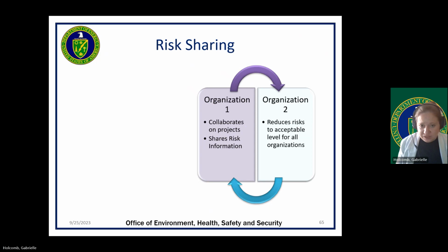So, risk sharing occurs when responsibility for risk assumed by one organization can be shared with another. Although this method may not eliminate the risk, it may reduce the risk to an acceptable level. Organizations with different risk tolerance levels may be able to use risk sharing to align responsibility for different types of risk with the commensurate risk tolerance levels, and to assign responsibility for specific types of risk to organizations with the appropriate expertise or resources to address them.